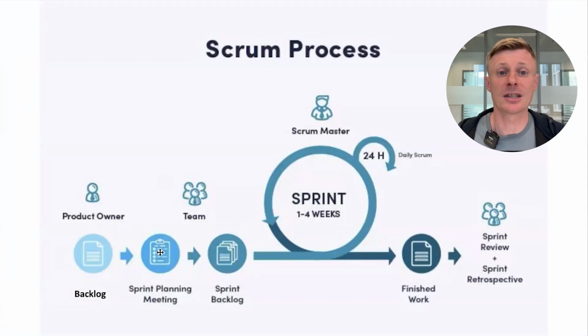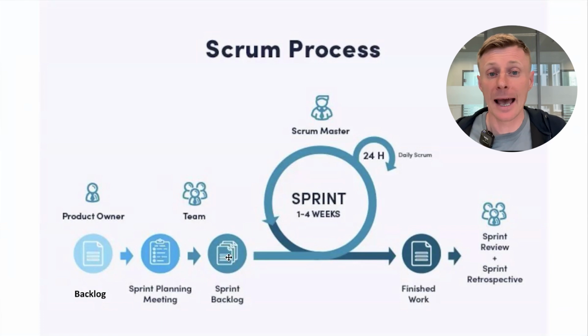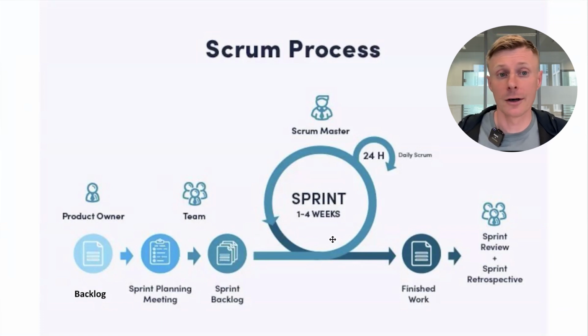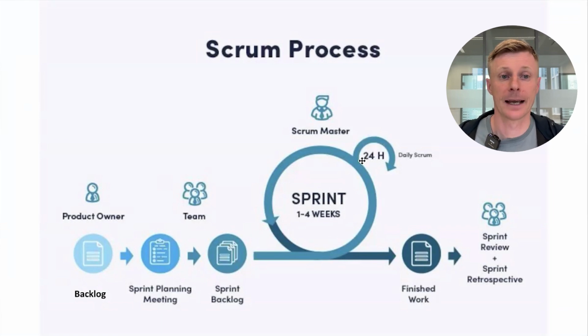Each sprint begins with a sprint planning meeting, where tasks are pulled from the backlog into the sprint backlog, estimating with story points using so-called Scrum poker, and then the work begins. Daily stand-up meetings lasting about 15 minutes each help keep the team aligned.